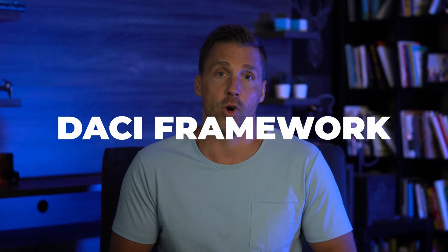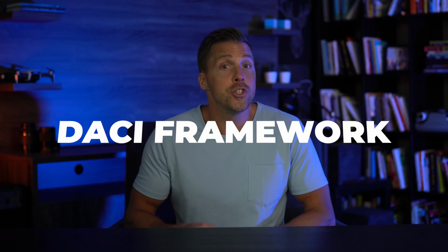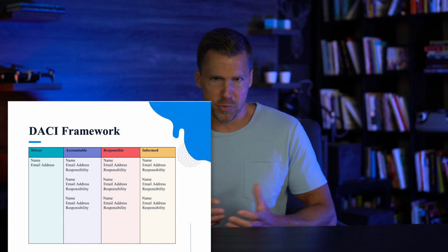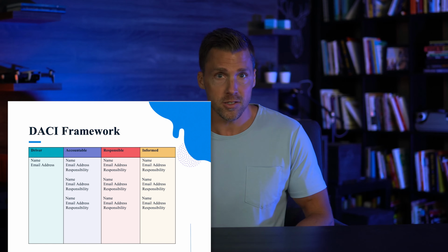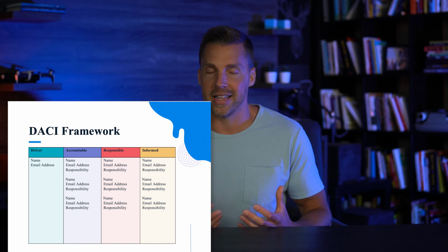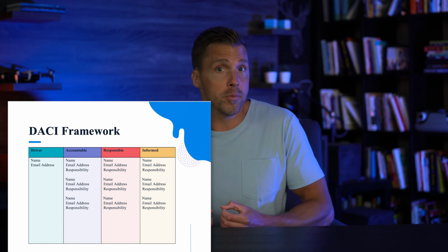From there, it's time to put this all into action, which means using a tool like the DACI framework. The DACI framework outlines who's responsible for contributing to this project and what role they have. Specifically, it highlights who the driver of the project is, the D, any approvers of specific parts of the project, the A's, the contributors who handle deliverables and might be responsible for creating the ads or messages, the C's, and those who need to remain informed along the way.